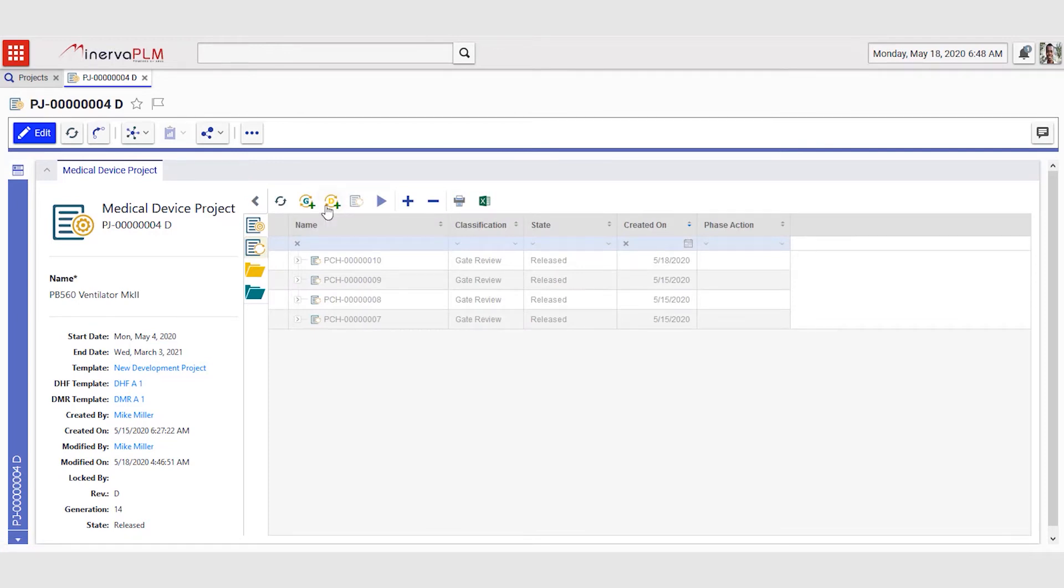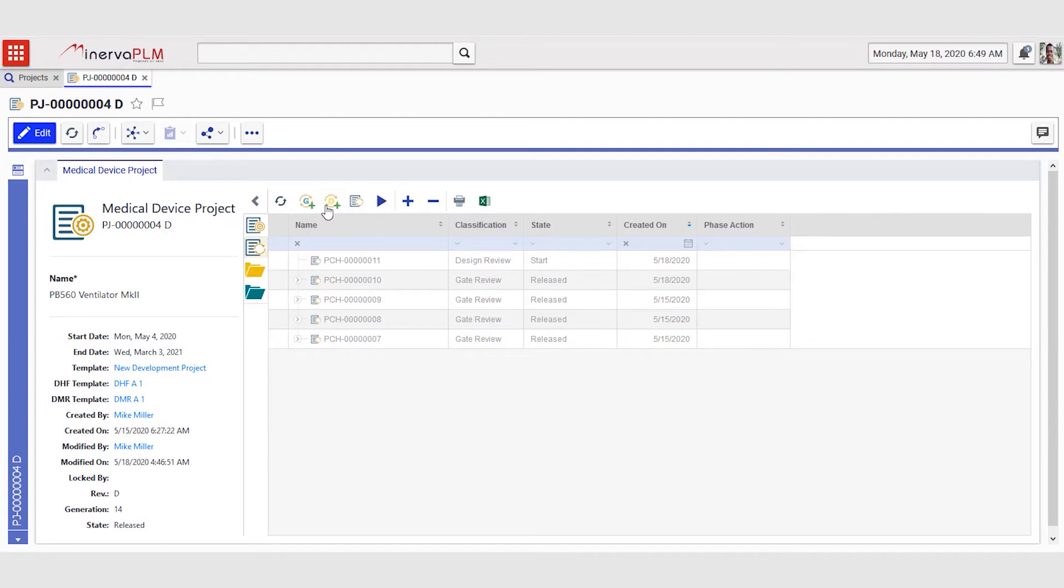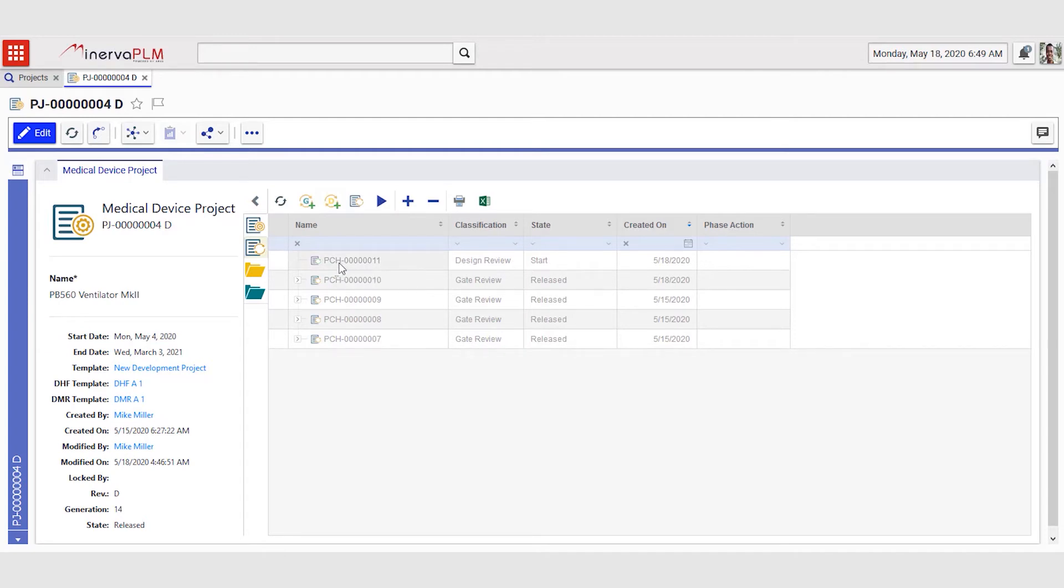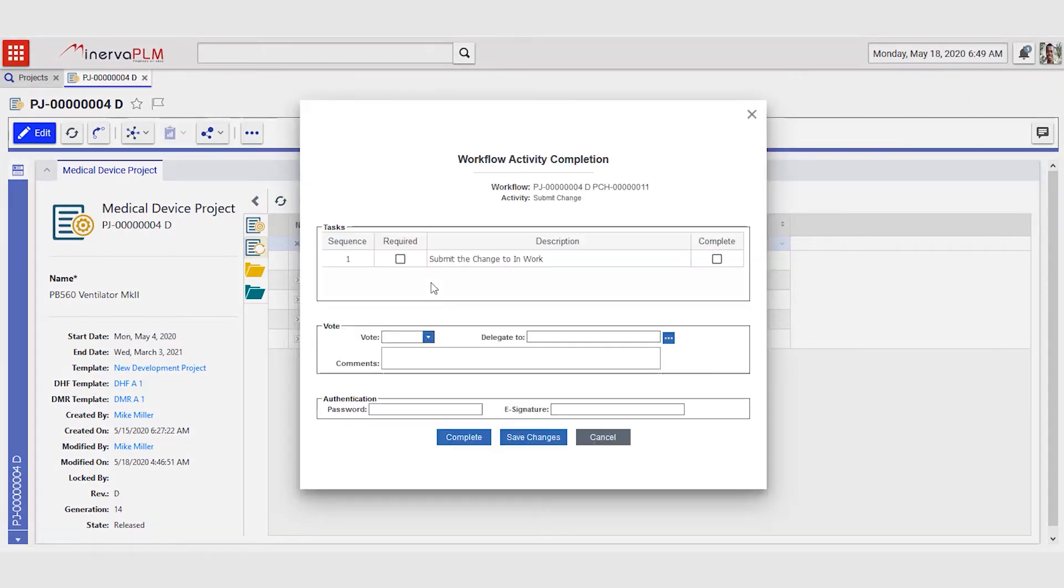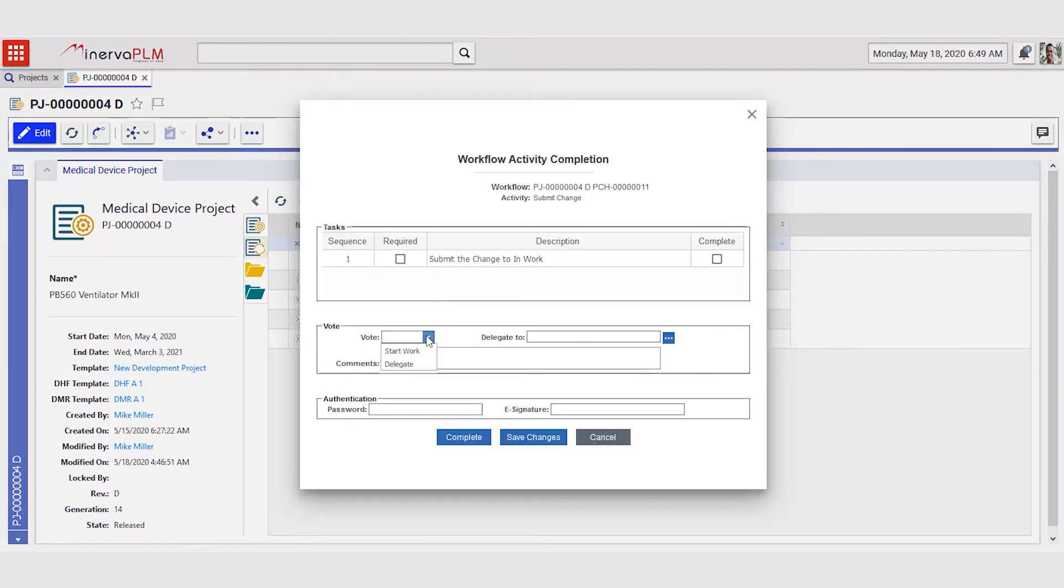This is done in order to maintain the audit trail and the traceability of changes that have been made. These changes can be automatically created from the change section of the project by clicking the design change button. This will automatically create the change order which Mike can now automatically go in and vote to the next step.